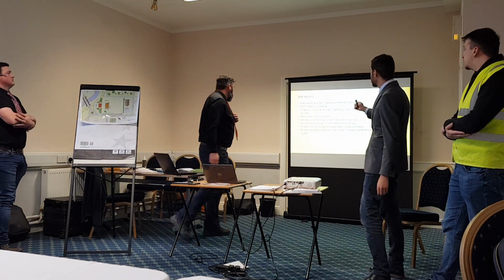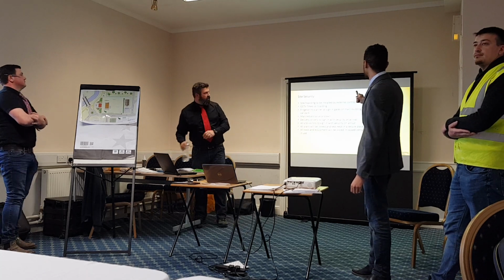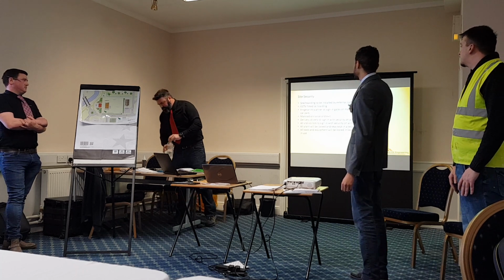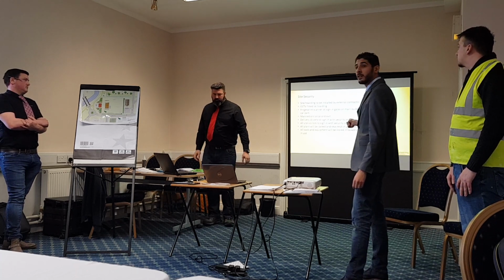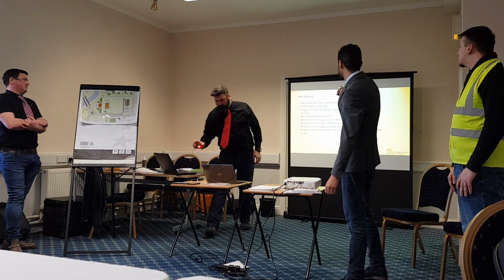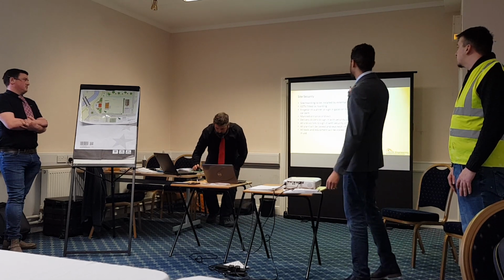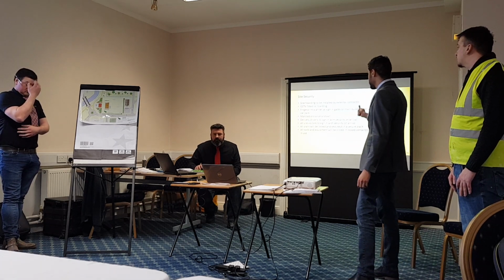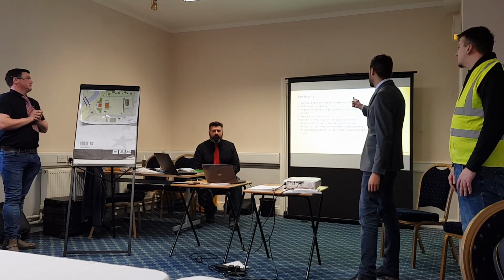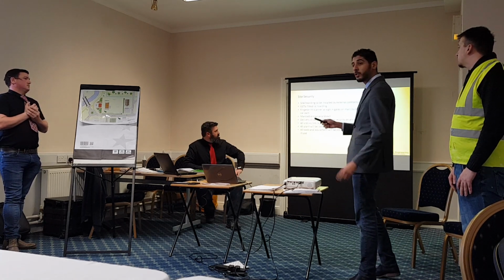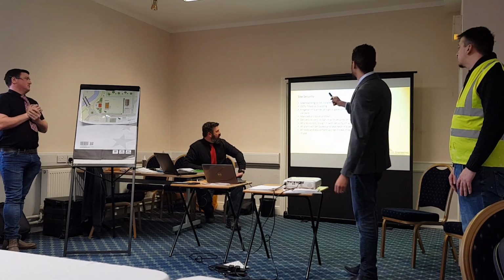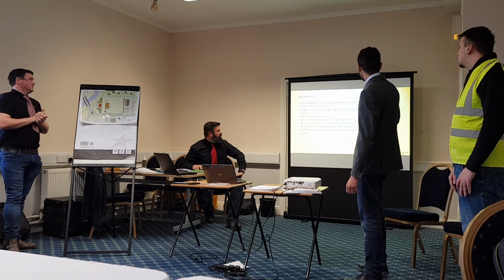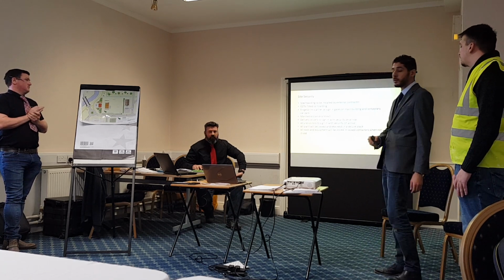Regarding the site security plan, site hoarding to be installed by an external contractor, CCTV fitted to hoardings, fingerprint screens at sign-in and gate, managed entrance and exit, delivery drivers to sign in with security on arrival, and all visitors to be signed in once they arrive on site. All plans will be locked and kept in a secure place. Lastly, all tools and equipment will be stored in containers when not in use. So this is part of our security plan.